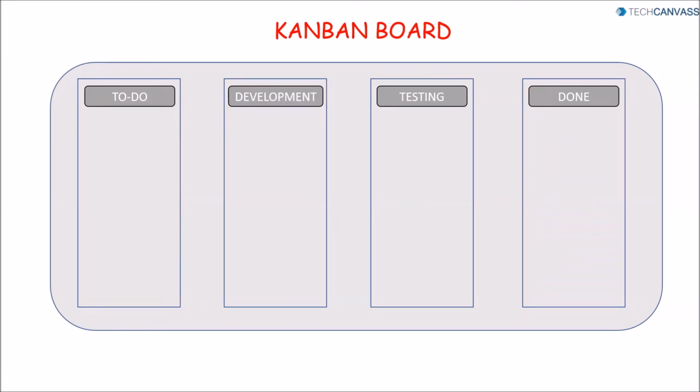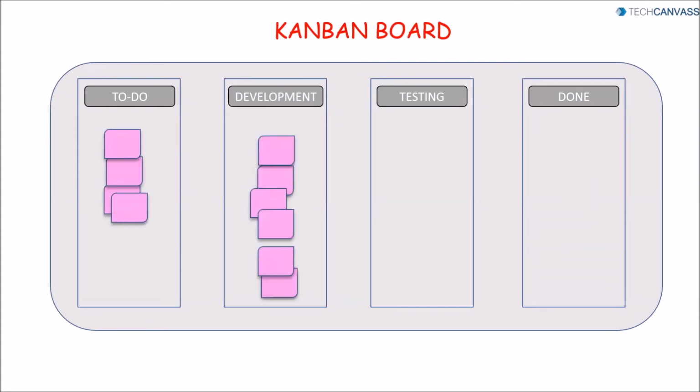So a Kanban card moves through the workflow from one swim lane to the next swim lane, and this shift is dependent upon the bandwidth of the next lane. Each swim lane is set with a WIP limit. If we don't set the limit, one swim lane can get clogged with multiple work items and this will result in swim lanes on the right side being empty and the team being underutilized. So it is required to set a limit for the lanes.